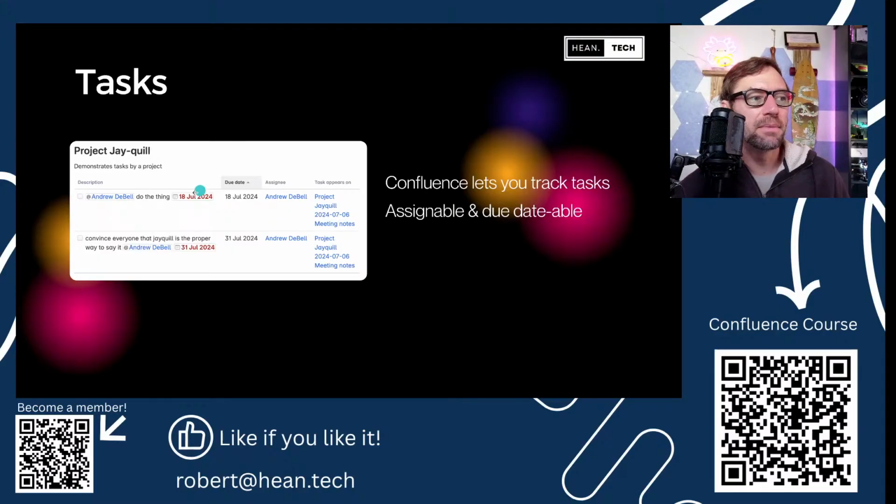That's why I think through how I personally use it. I use tasks mainly in real time. If I'm in a meeting with Mark and he's just going, hey, we've got to do this, we've got to remember that, I'm quickly adding tasks to a Confluence page to remind me later to come in and address them. I typically expect my team to work in Jira and to use Confluence for knowledge, and I'll talk more about how we integrate those. But I'm typically using tasks for myself because I'll be sitting in a meeting and I have to remember 7 different things. I don't want to have to go make a Jira ticket for everything. Instead, I'll just quickly make a task, assign it to myself, and address it after the meeting.